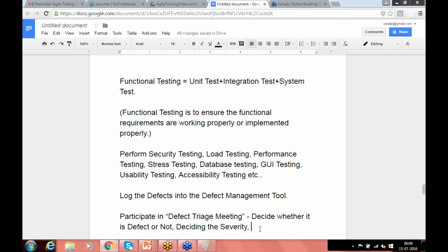Not every defect is of same criticality or complexity, as we all know. So we categorize them into severity 1, 2, 3, 4, and that definition, where should that be explained? What do you mean by severity 1, or what do you mean by severity 4? Where that needs to be explained? Master test plan. Correct, like yesterday we discussed, right? So that should go into the master test plan, because tomorrow when you find a defect and when you log it, nobody should have an objection. Nobody should come back and say, why are you putting this as severity 2? Then you say, according to the definition that we all agreed in the master test plan, one of the major features is down, so I'm putting it as severity 2.